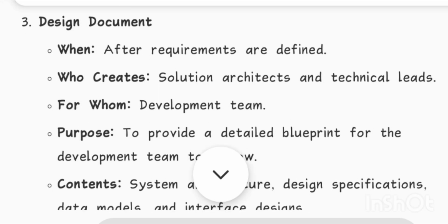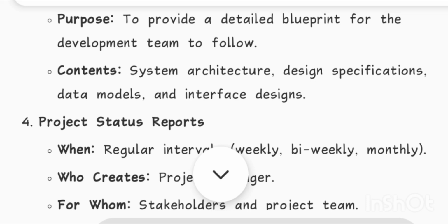3. Design document. When? After requirements are defined. Who creates? Solution architects and technical leads. For whom? Development team. Purpose: to provide a detailed blueprint for the development team to follow. Contents: system architecture, design specifications, data models, and interface designs.